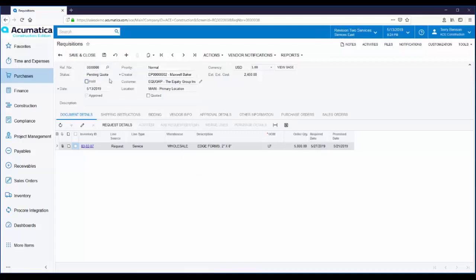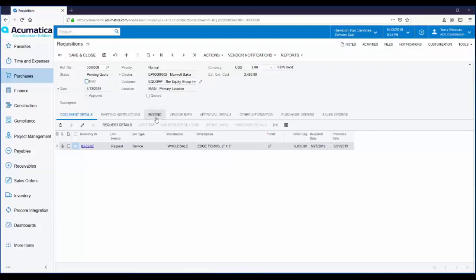I'm going to go ahead and take this off hold and you'll notice the status changes to pending quote. Optionally, we could have enforced electronic routing and approval of the requisition. If this was a large requisition, you might want to get bids from multiple vendors.